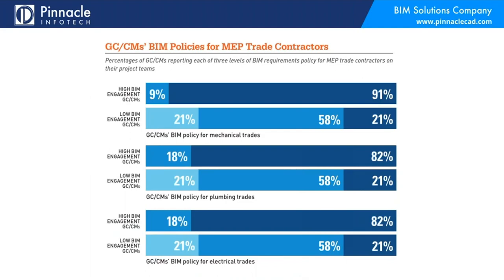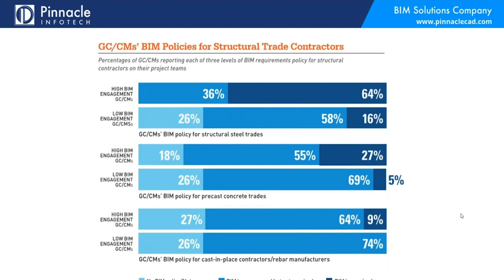Similarly, GCs can put policy in place requiring trades to come ready to play BIM. The top lines — mechanical and plumbing — show that among GCs in the deep end of the pool, 91 percent and 82 percent respectively are insisting on BIM readiness as an absolute requirement. For electrical it's also strong. The middle blue encourages it without mandating, and hopefully the dark blue keeps getting bigger while the light blue gets smaller as we revisit this in the future.